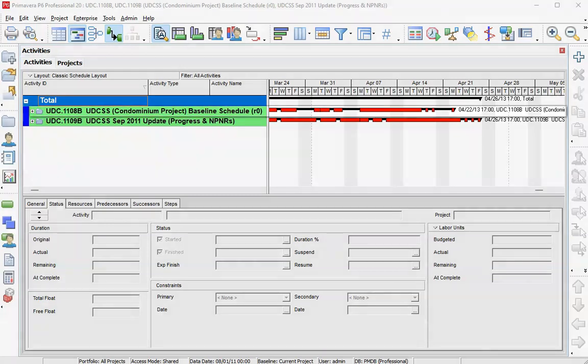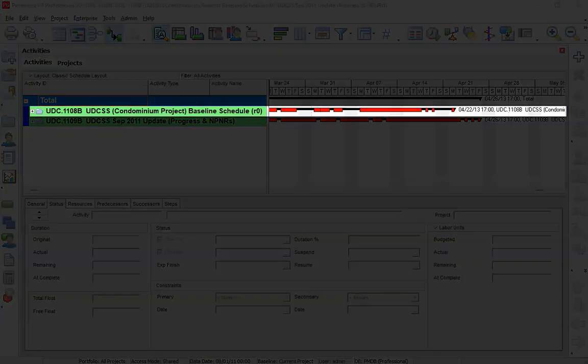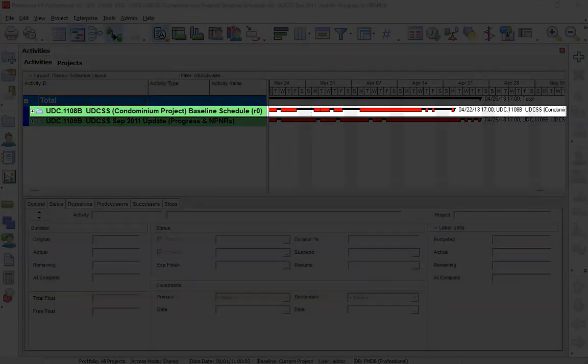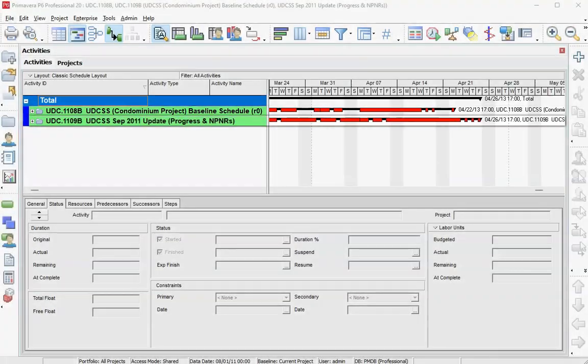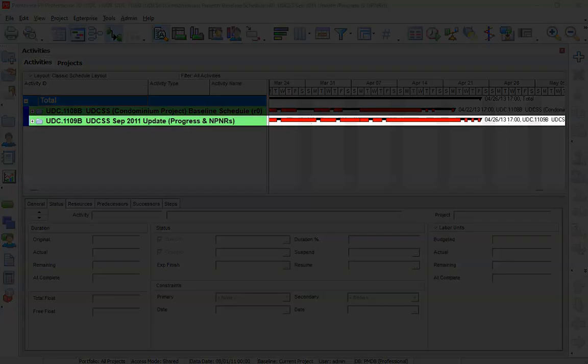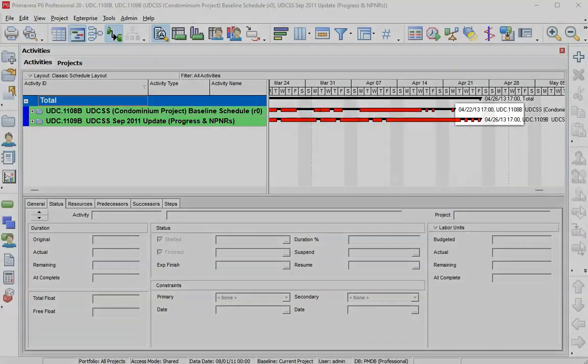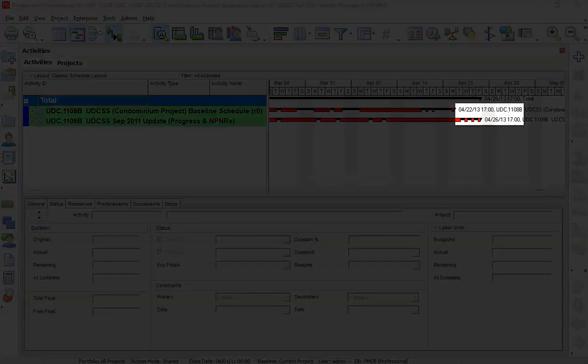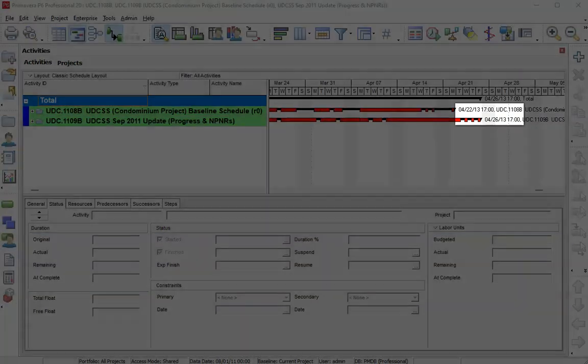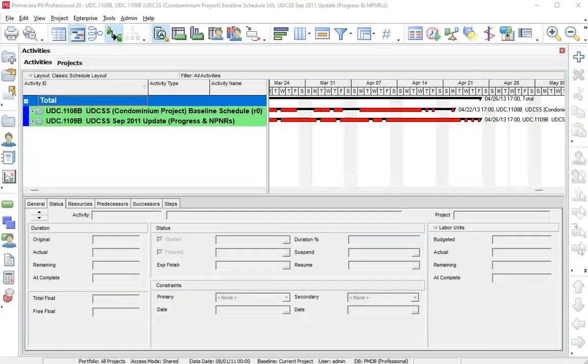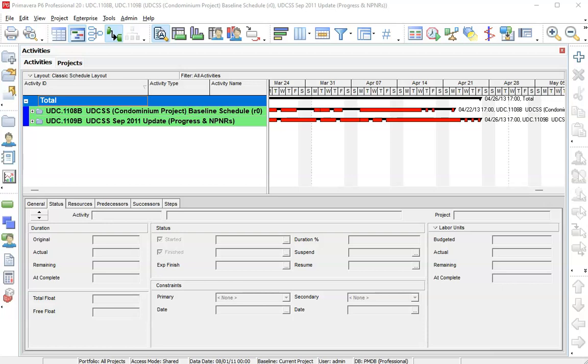We're in Primavera, and we're looking at a baseline schedule and the same schedule one month later. We can see that the finish date slipped from April 22nd to the 26th, which is four calendar days. Since it occurs in the week, it's also four working days. So let's look at the same schedules in Delay Analyzer and dig into how and why that happened.